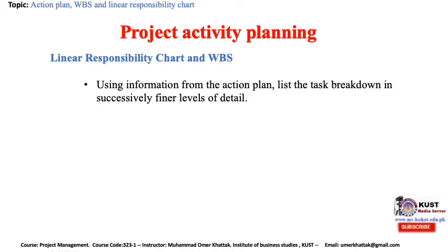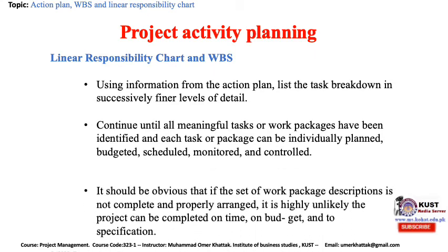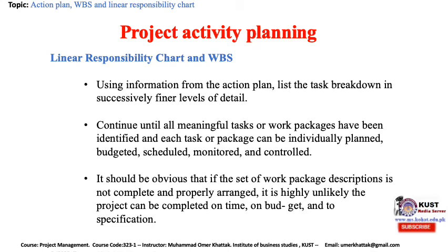Using information from the action plan, list the task breakdown in successively finer levels of detail. Continue until all meaningful tasks or work packages have been identified and each task or package can be individually planned, budgeted, scheduled, monitored, and controlled. It should be obvious that if the set of work package descriptions is not complete and properly arranged, it is highly unlikely the project can be completed on time, on budget, and to specifications.